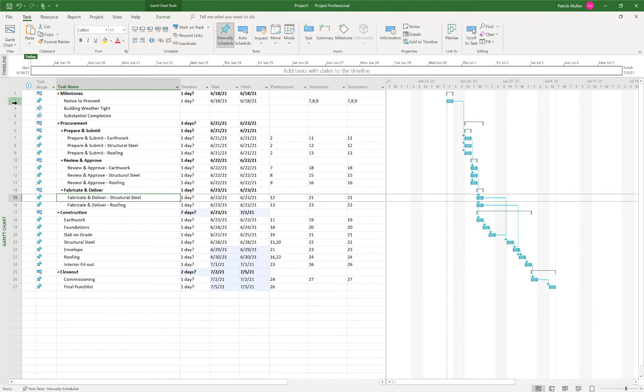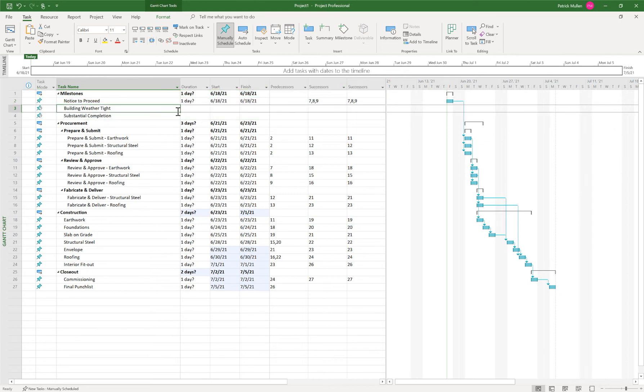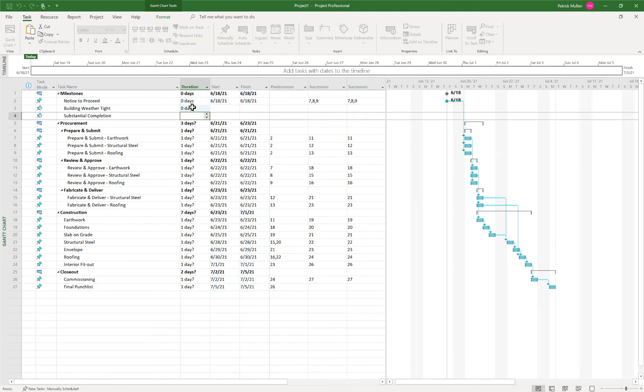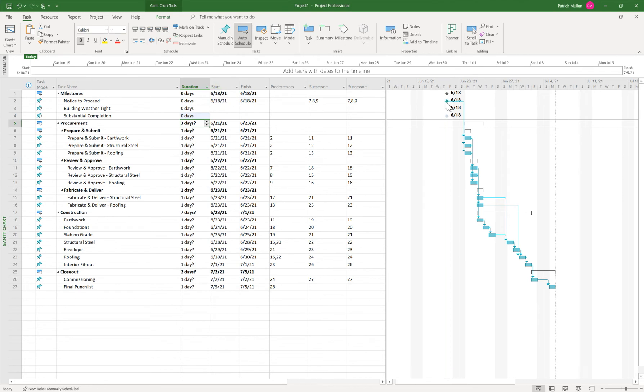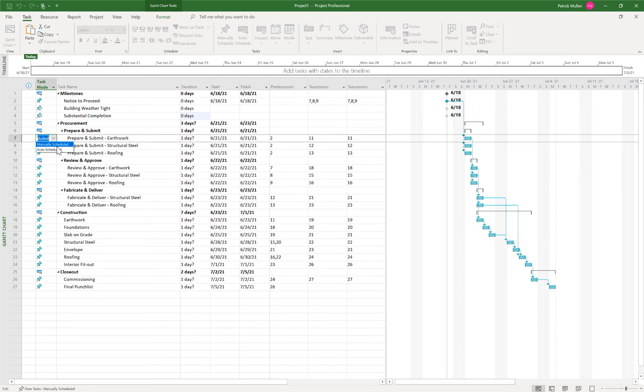A couple of things that I noticed: my notice to proceed activities, we haven't defined the duration for those yet, and they should be zero since they're milestones. So one of the things in project is anything that has a zero day duration is automatically classified as a milestone. And you'll see those over here get changed to milestones. These are all manually scheduled tasks.